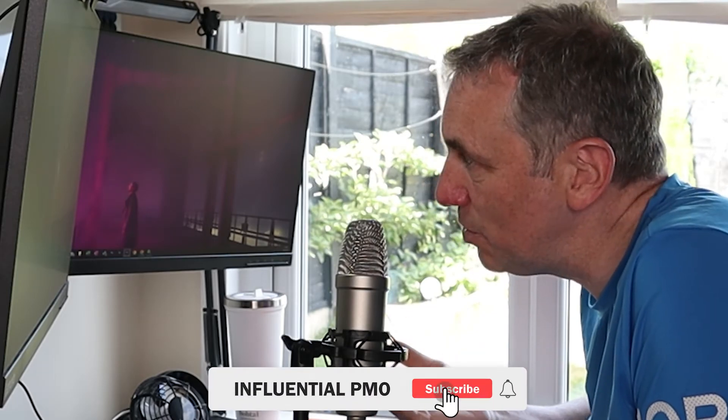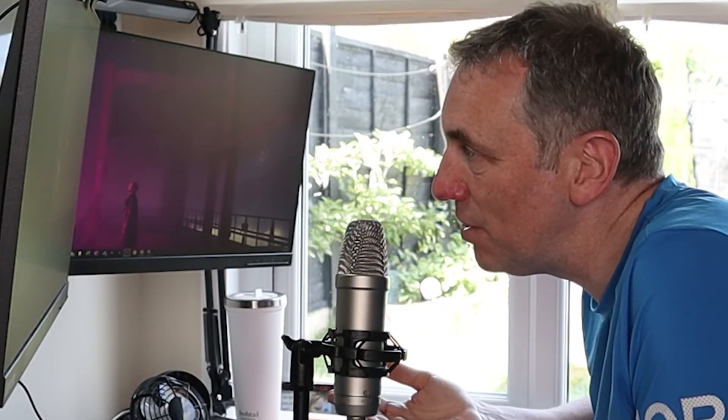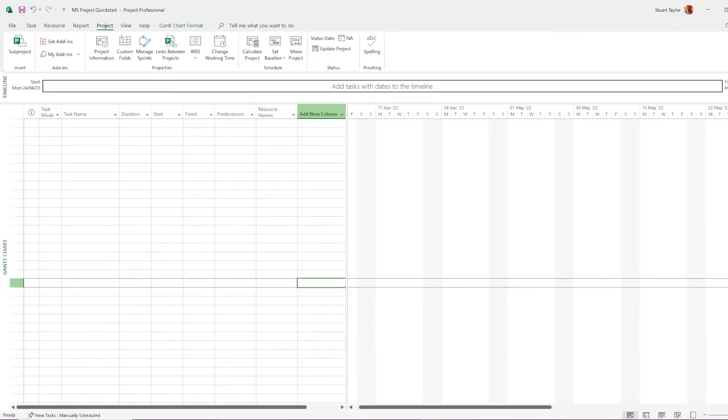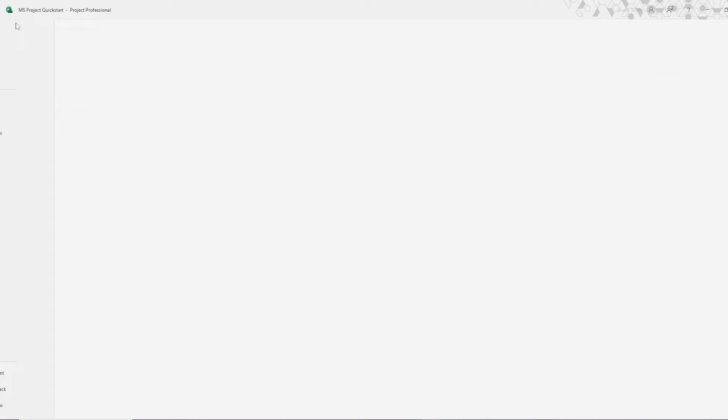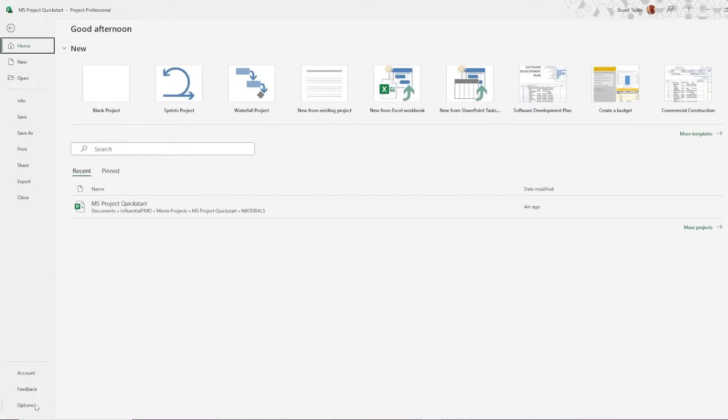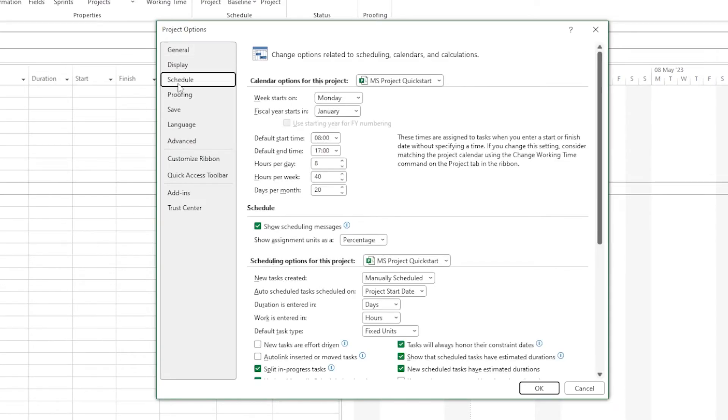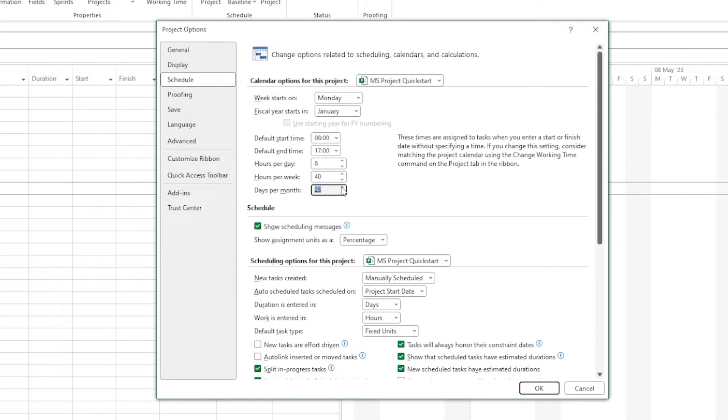It's a good idea to include dates that you're not working on your project. So think ahead to things like national holidays, bank holidays and any other time that you'll be off. Click on the Exceptions tab and you can enter the details there. I know this seems like a lot of effort to do upfront, but trust me, you only have to do it once and it'll stop you doing strange things like scheduling people to work on Christmas Day. Let's just check on some of the default information around this project. We go to File, down to Options and then select Schedule. Double check here to make sure that the hours per day, the hours per week and the days per month are correct for your project. In my case, I'm working a few more days per month than most. You'll notice I've left new tasks created on manually scheduled rather than auto scheduled. That's just a personal preference. You may want to switch that. Click OK when you're done.